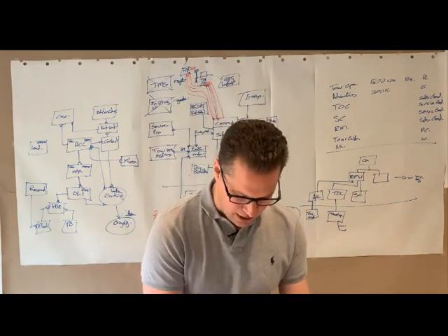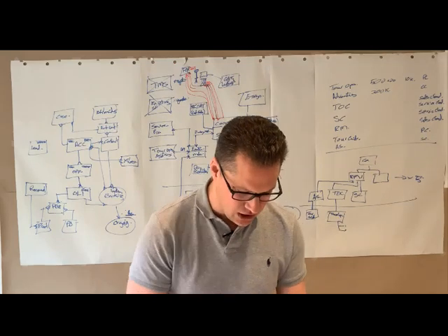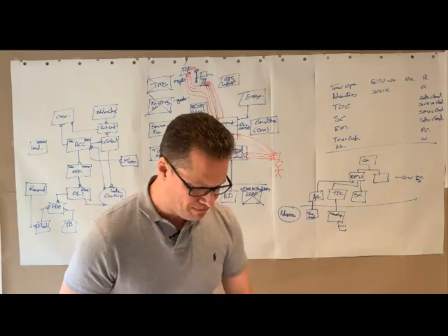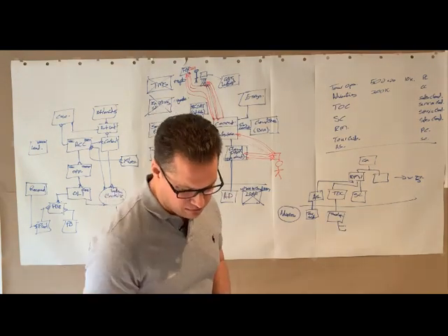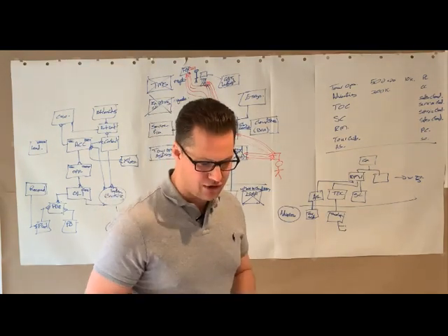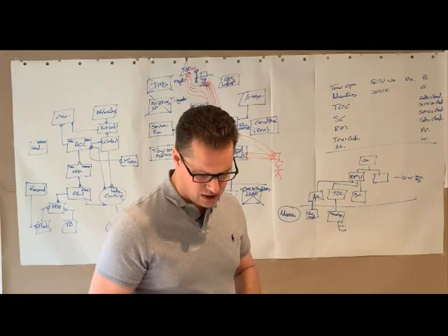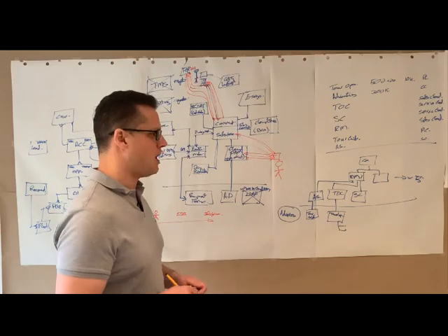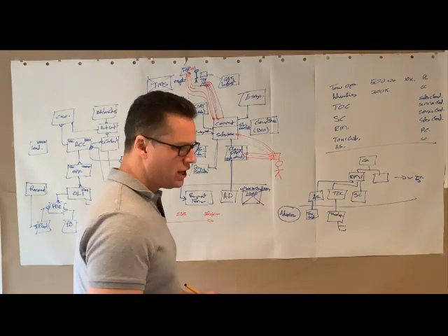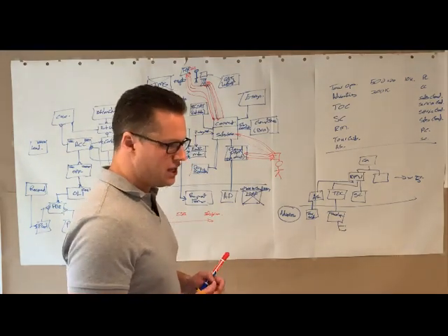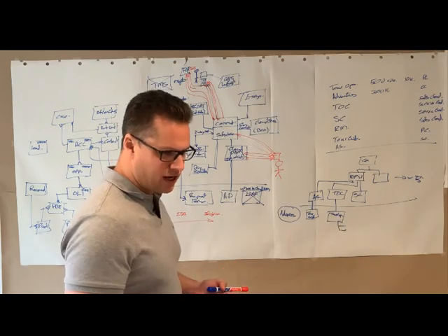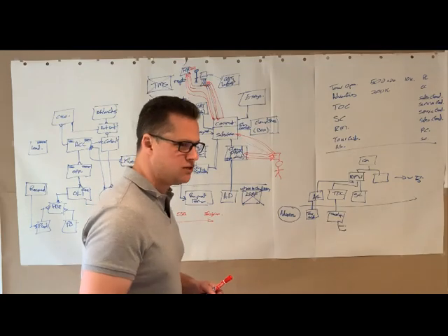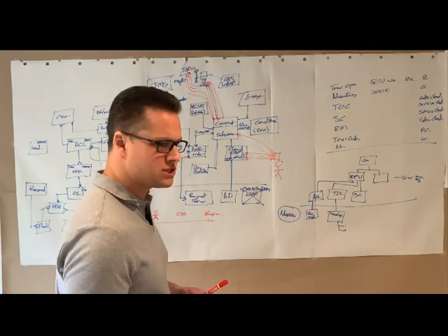So, certainly we could look to go region by region. I think there wasn't anything particularly in the scenario which helps this decision, so I think the considerations would be this. We would be looking for any emerging regions to be the ones that we would start with first.